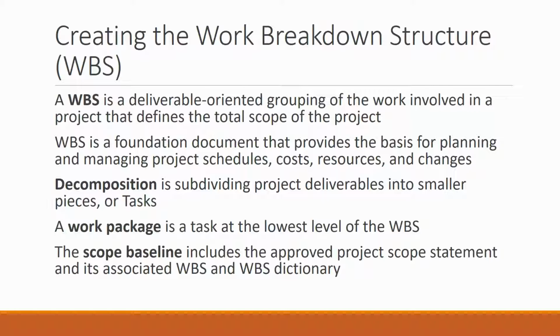Our work breakdown structure becomes our project schedule. It also helps us define our project costs and what resources we're going to need, because through our WBS we are going to develop tasks and activities along the way. You'll hear the term decompose or decomposition, and decompose means that we take the project deliverables and subdivide them into smaller pieces, which are tasks or activities.